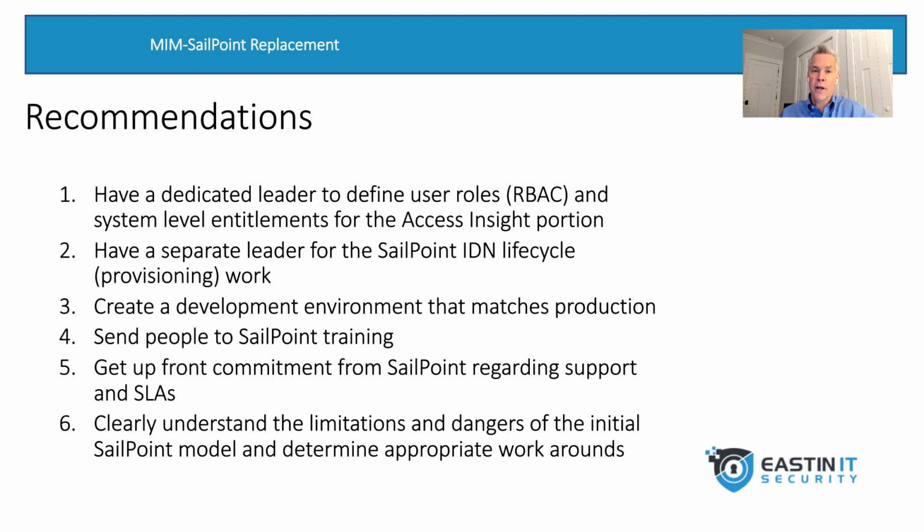Next key recommendation is you want to understand the limits and dangers of the SailPoint deployment model that we talked about. And you're going to have to determine the appropriate workarounds for your organization. And again, those key limitations are A, birthright access, the all or nothing model that they use when they do these deployments, and B, the inability to actually preview or see what type of changes are going to happen after you've synchronized the data. So you have no visibility into what it's going to do. And then finally, the third problem is there's no out-of-the-box report that shows you easily what it did. So that's something that you're going to want to think about up front and make sure that you know how you're going to handle those situations.